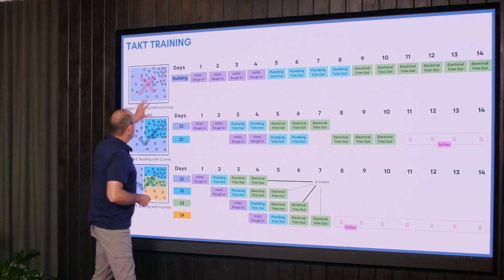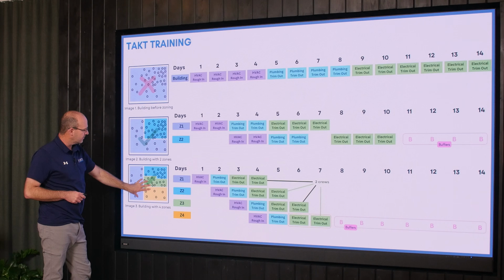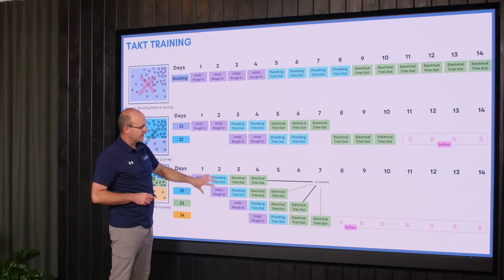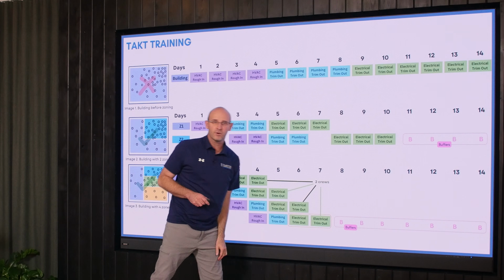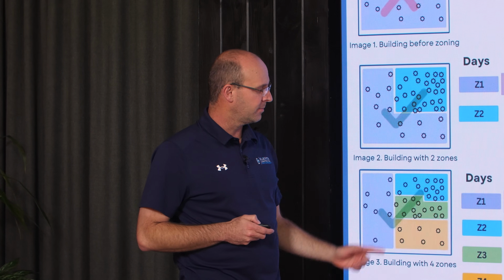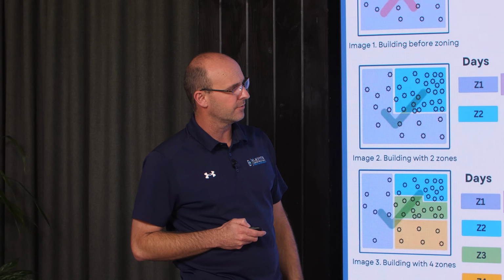My point is, you're constantly trying to find the right number of zones. We're constantly leveling, and we're constantly packaging out here to where we have the best overall duration. This helps you because you have less GCs, less GRs. You're out of the site sooner, and you're able to do other work. So this is better for you, especially because you're working in a flow.